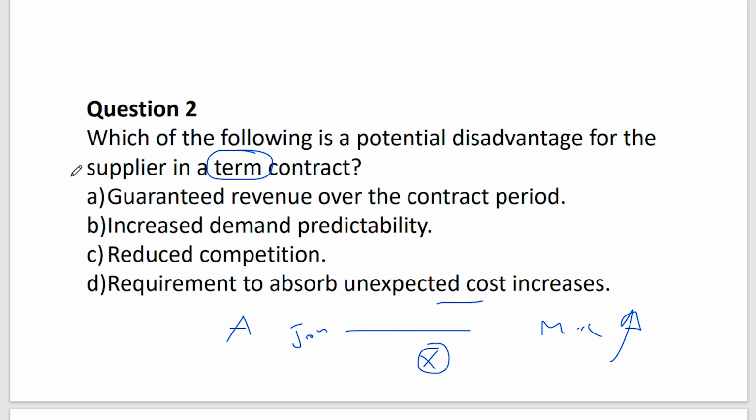But then there are ways around that. There are ways around dealing with the price issues. And you see those through things like price adjustment, okay? Depending on the sort of contract you have. Indexation and price adjustment formulas can help with those sort of issues, but you must have terms stating how the price is going to be adjusted and documentation to prove the need for that.